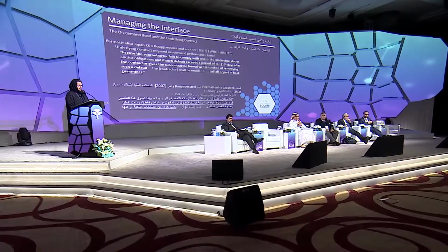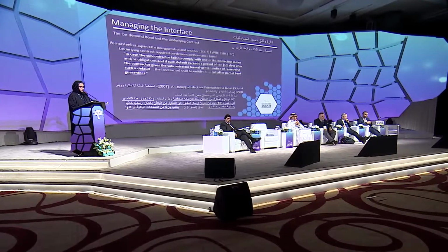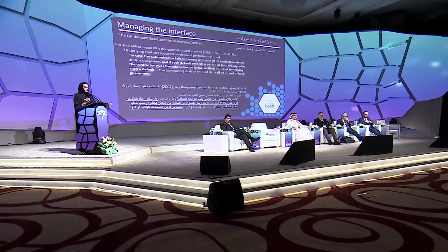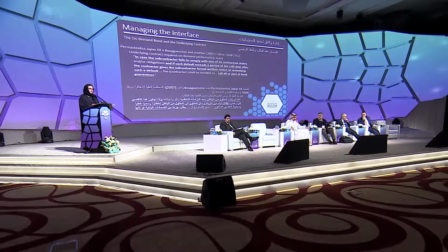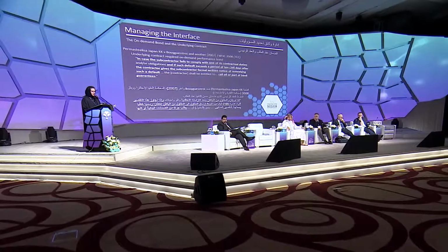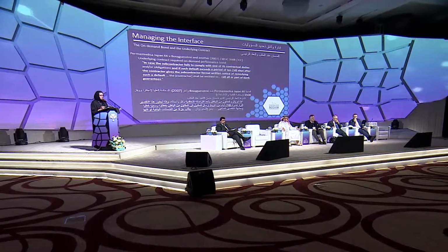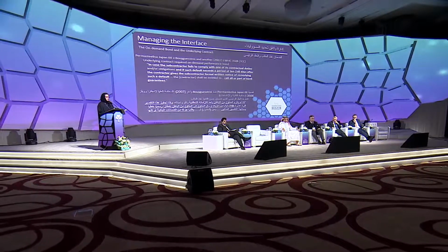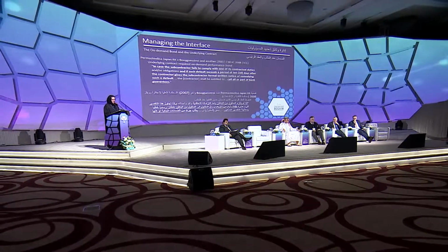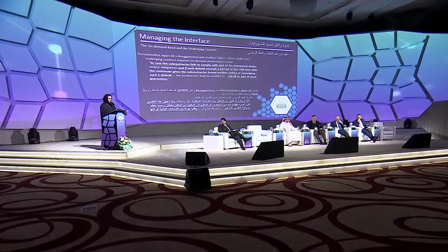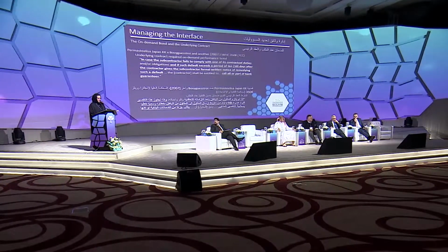At the full hearing, the subcontractor argued that the conditions of the subcontract actually stipulate that to be able to call on the performance bond, the subcontractor had to have failed to comply with one of the contractual duties, formal notice had to be given, and that default had to be for at least 10 days.